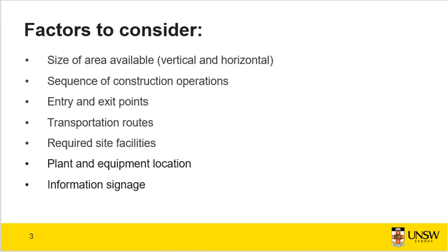Examples of some facilities can include site accommodation, the kitchen, lunchrooms, meeting rooms, first aid rooms, site offices, female and male bathrooms, so separate bathrooms for each gender, fabrication yards for precast concrete elements, parking lots for staff vehicles and shared vehicles, scaffold storage, vending machines, and a canteen, etc. Sometimes modular site offices and facilities are arranged on top of each other to optimize safe work environment areas and to overcome severe space restrictions.